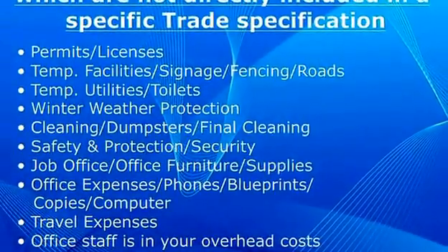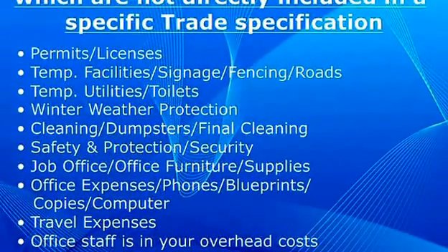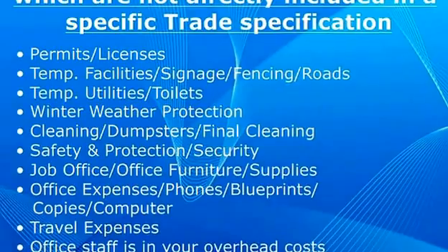Cleaning, dumpsters, final cleaning. Another cost that can vary. It can be through the roof, or it can be very cheap depending on how you look at doing the job. You know, cleaning is getting to be a very big issue with most owners, especially if you're in existing buildings. If you're obviously on a public street where you're going to have to clean the street, these are all dollars that you have to figure out. How you're going to clean this job and know what your subcontractors have included in their job for cleaning. You don't want to double up. Obviously, you're just raising your bid. So cleaning is another one.